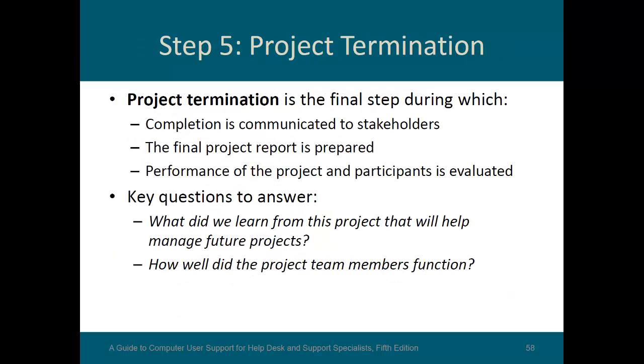Project termination is the final step. This is not a bad thing. It's the final step during which completion is communicated to stakeholders. The final project report is prepared and performance of the project and participants are evaluated.